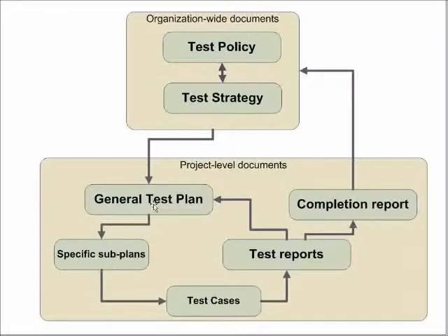Then we have the test cases, which combined with the test plan give us the test reports, which are then used to define a better test plan or find the gaps or fill out the problematic areas. When we find that something doesn't work, we fix it and see that it works now. When we are satisfied with the product, we make the completion report or have some sort of a dissection seminar or project ending formalities, giving feedback to the organization, which in some cases may even end up updating our ways of doing things, or for example that we have to update some tools, have to have more testers, or that we didn't have enough time or money to do all the test work necessary here.